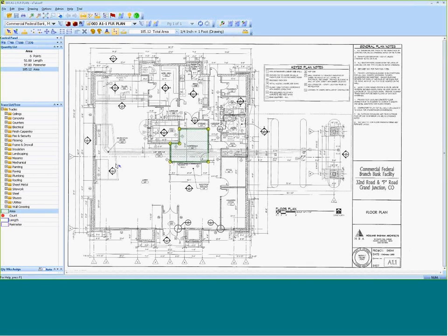And when I'm done, at that area, it's colored. When I click on it, I see the parameters that I have for that. I've got the area, square feet. We also keep track of the perimeter lineal feet for you, so you don't have to worry about it. If you're doing flooring, you already get the perimeter, so you don't have to do another measurement.